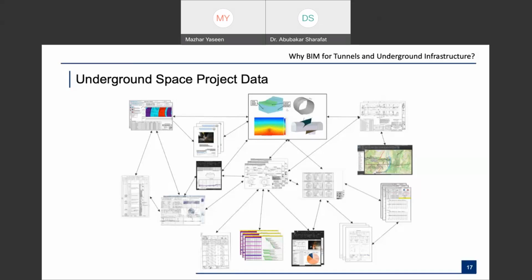And then we have the design drawings, and then we have the geological information, which is a critical part in a tunneling project. And generally this information is coming when you are excavating. We have the geological information, but it might not be that accurate during the feasibility or the design stage. And then we have the productivity and daily progress, so you can monitor when you're going to complete your project.